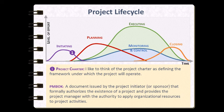We are also less interested in defining acceptance criteria as we are in identifying who will benefit and be affected by the project, and what each of these stakeholders' needs and expectations will be with regards to the project. And most importantly, we are interested in ensuring that once we have defined our project charter, all the primary stakeholders agree that the framework we've created will give the project a reasonable chance of success.